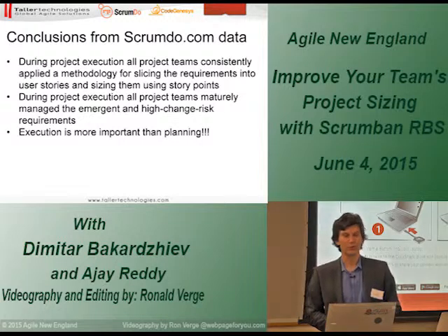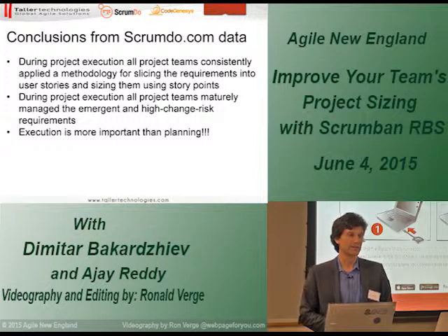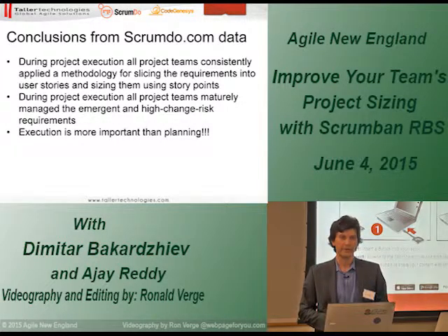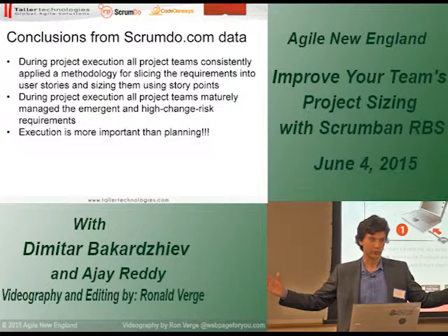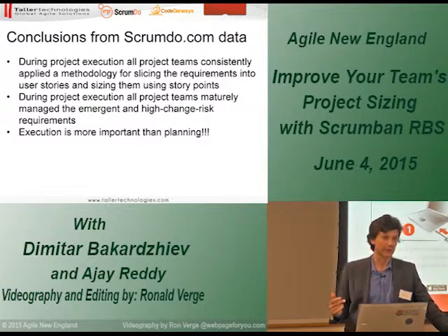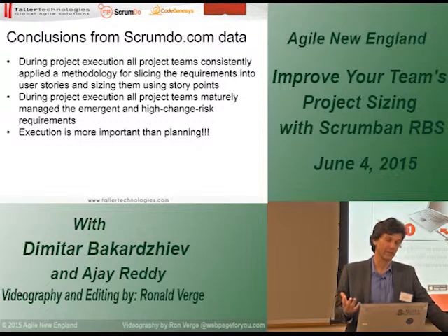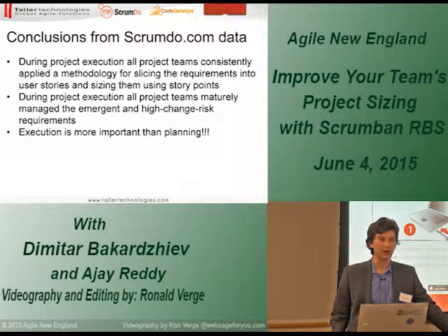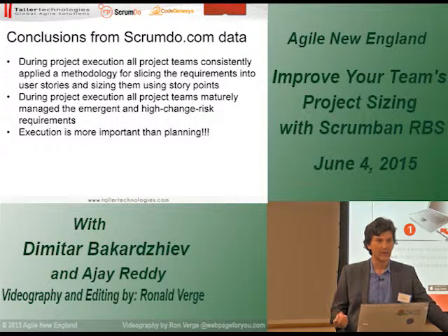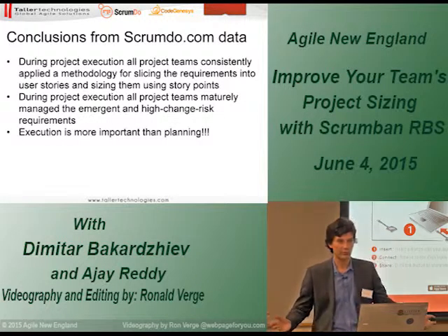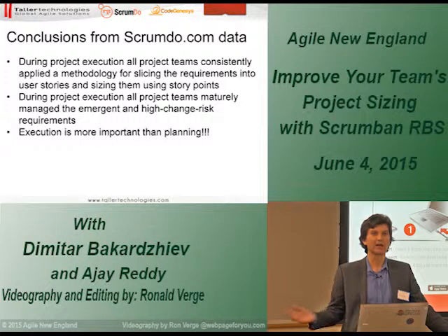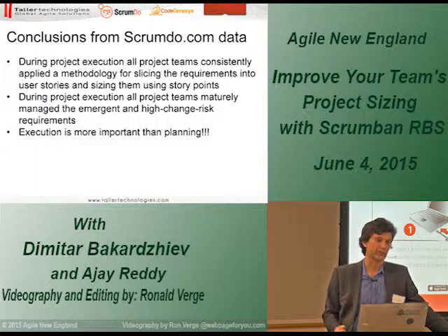So, long story short, last year I modified a forecasting technique using bootstrapping and Monte Carlo for estimating delivery time for a project. And it is really useful. The major obstacle is that in order to use this technique, I had to know the number of user stories. And for a big project, let's say 300 user stories, there is no way to know the number initially, right? Without analyzing and breaking down all the epics into stories. So that was the main obstacle.